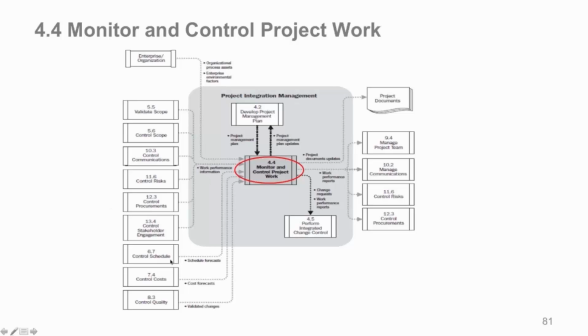Down here under your schedule costs, you have your schedule forecasts, and here again we get into earned value forecasting, and particularly under cost, we do earned value forecasting. Are we on track now? If we keep up this rate, where are we going to be in 2 months? We're going to be out of whack. So you do your forecast, and then you control them if you need to.